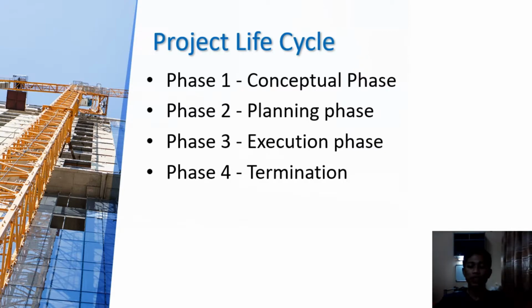A variety of possibilities may be taken into consideration in the conceptual planning stage. Hence, the technological as well as the economic feasibility of each option will be assessed and compared to select the best possible project. The financing strategies for the proposed options and ideas should undergo a clear examination, which is later programmed with respect to the timing for project completion and based on the cash flow availability.